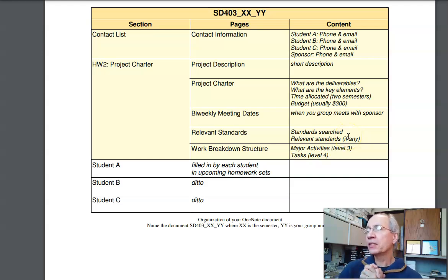And finally, here's the important part. On your project, brainstorm with your group. Try to split up your project as major activities, what are the technical challenges you need to solve, and most important, come up with a list of tasks that you need to complete. That list is really important. That list is going to basically drive the rest of Senior Design 2. That list you're going to split up in the next homework assignment as to who does which task.